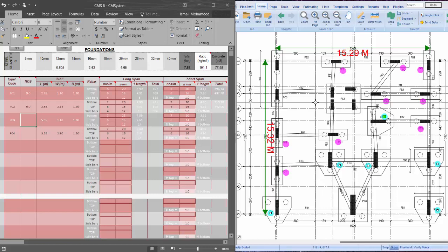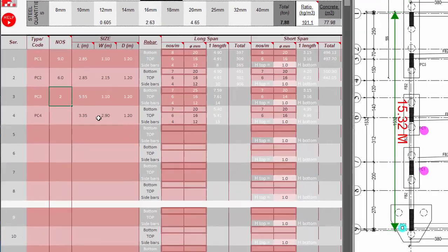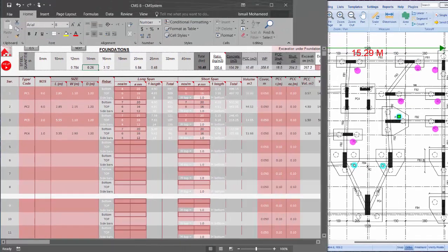to insert for all types of beams, tie beams, slabs, masonry work, and whatever. We normally need to insert all this data. And as you see, after continuing and inserting all the exact numbers, we'll find here CMS gives us the quantities of concrete plus the quantities of rebar in each diameter, as you see now, without any calculation.